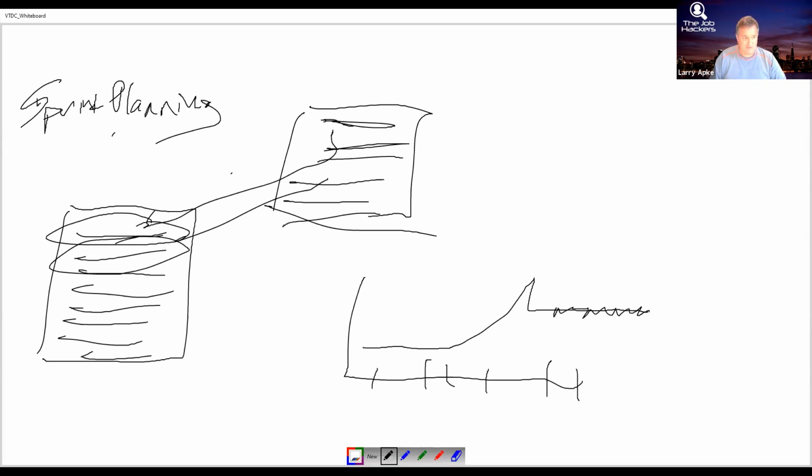Whatever this number is, let's say it could be stories. We do 10 stories plus or minus 2 per sprint, or you can go into the detail because you should have effort on everything, relative effort, right? We call that story points. You could say we move 20 story points, SP, plus or minus 3 or 4 or 5 or whatever that number is, right?